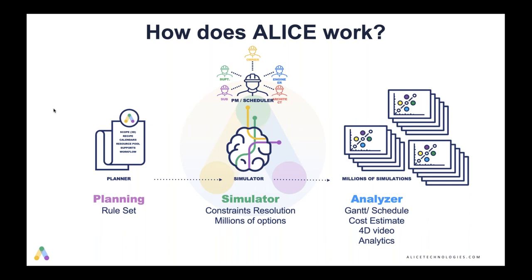Now, ALICE is doing the number crunching for you, exploring millions of different options. And as it goes through these options, it learns which one produced the fastest schedule, and then it focuses on those. So as you watch ALICE run schedules, you're going to see that the duration may go from 1,000 days to 950 to 920 and then end up at 890. ALICE continues to accelerate the schedules by trying different variations of crew mixes and equipment, based on the constraints and the parameters that you've set, and then identifies the best plan.